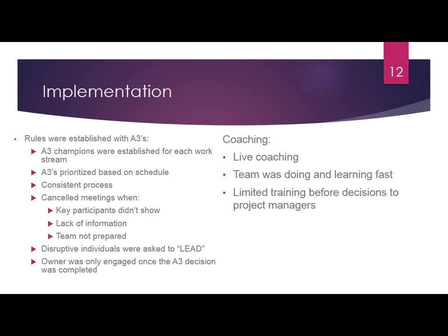And then once they started with the decisions, more and more people were getting engaged because they were realizing that actually the decisions stick with them. And the owner only engaged in the decision process once the team had all the information and could provide a complete recommendation.